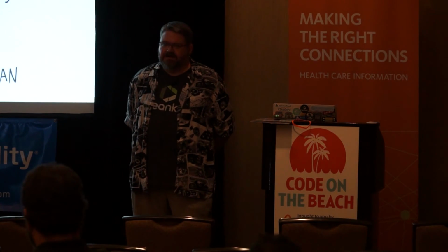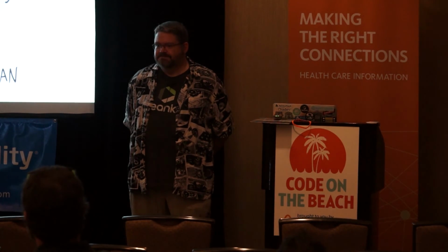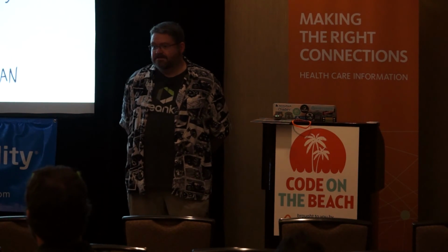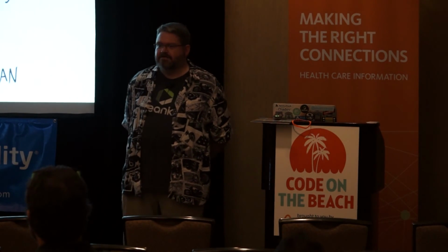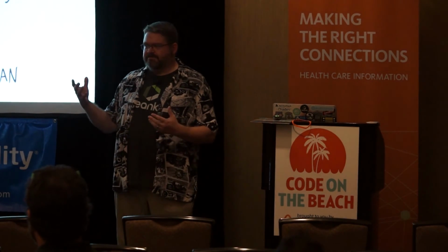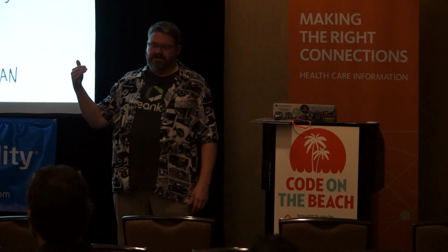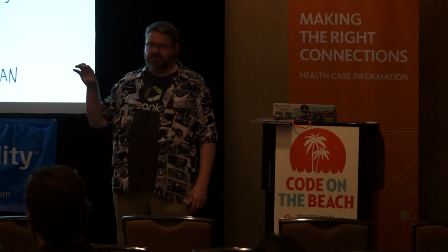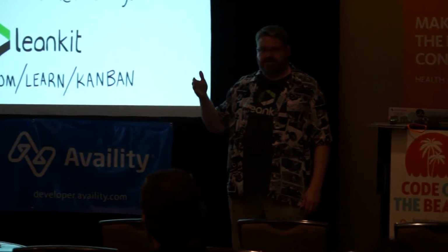So our goal is to break down work into what we feel like are manageable chunks. What's manageable, like a week to get done, a day? It's up to the team, really. What the team decides, how they want to manage their work, how granular. So we have a card that maybe represents a feature, and inside that card is a drill down into a smaller Kanban board of tasks.